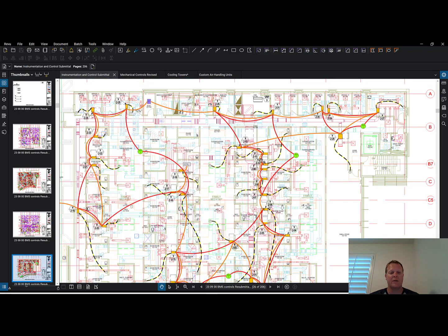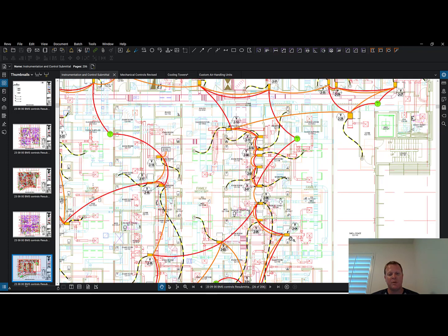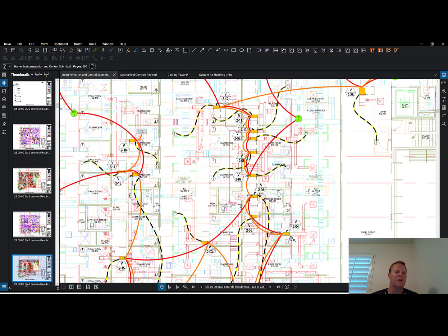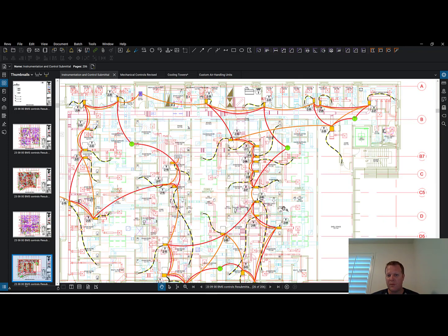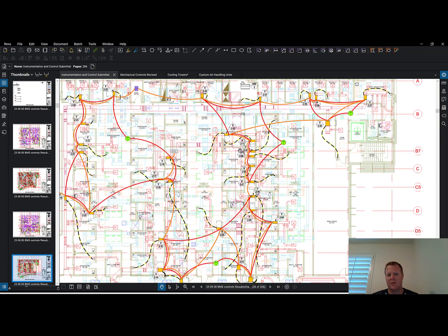They're going to hire it out. If I'm going to hire this mechanical contractor, do I need, as the general contractor, to go hire another control contractor to do all this control wiring for them? Because typically the people doing mechanical duct do not do low voltage wiring. Who's going to do the controls for it all?